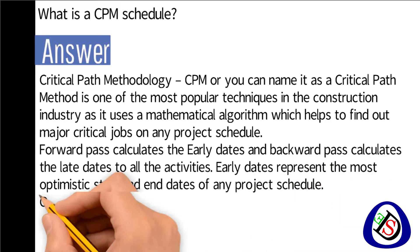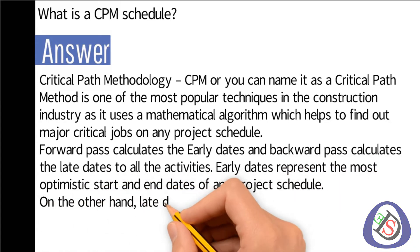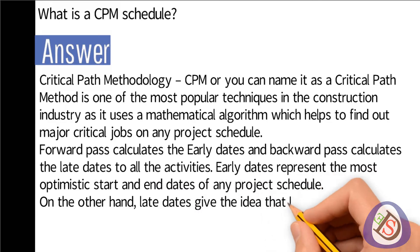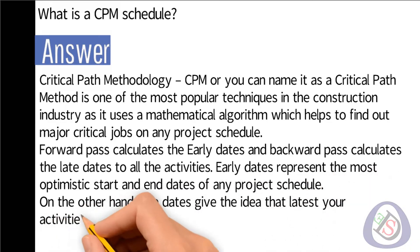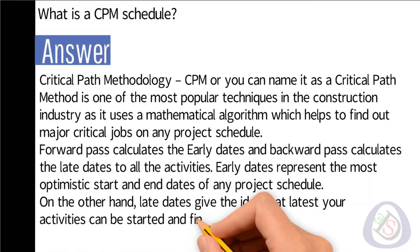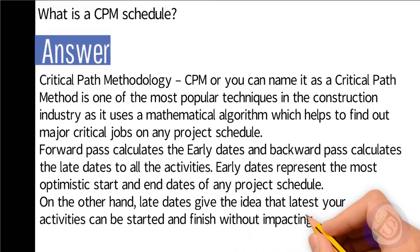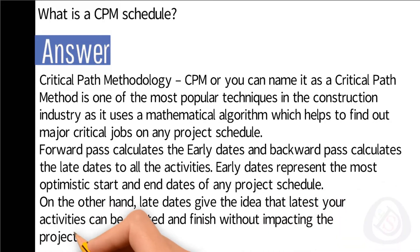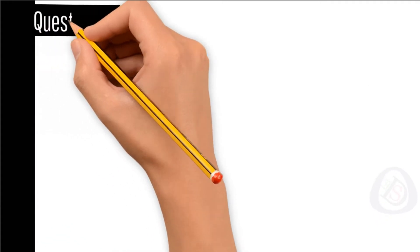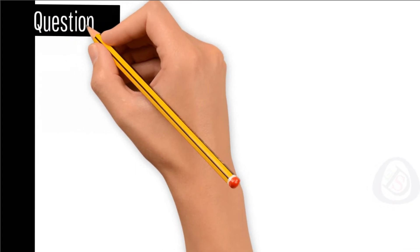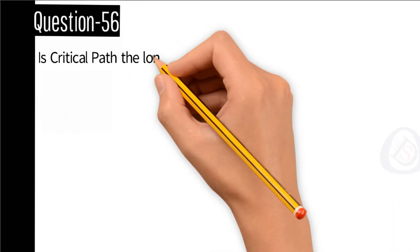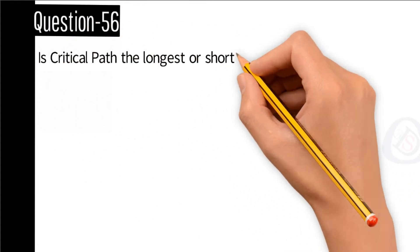Early dates represent the most optimistic start and end dates of any project schedule. On the other end, late dates give the idea of the latest an activity can be started and finished without impacting the project finish date.